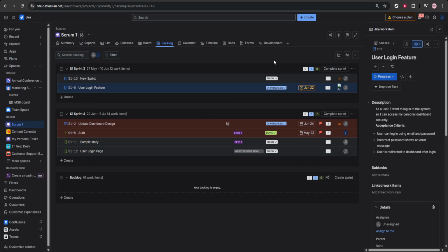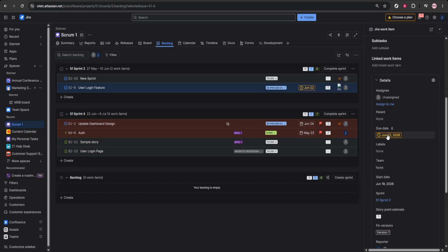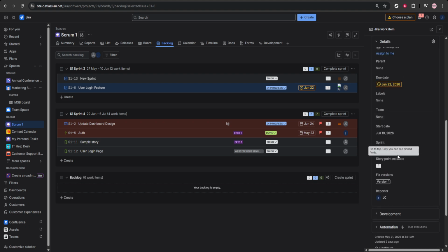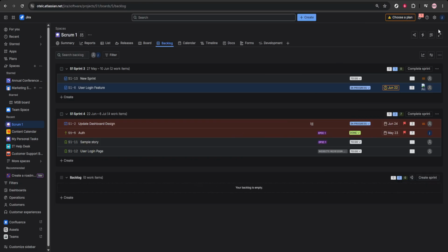Once that's set, review each team member's tasks. For each person, open the issue they're assigned to and check the status, current progress, any blockers, and the due date. This gives you a clear picture of where work stands before or during the discussion. It also helps you catch risk early, especially if something is delayed or waiting on another task.